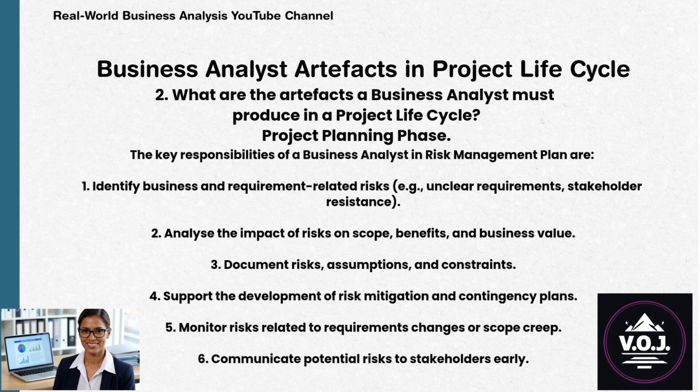The key responsibilities of a business analyst in risk management plan are: 1. Identify business and requirement-related risks, e.g., unclear requirements, stakeholder resistance. 2. Analyze the impact of risks on scope, benefits, and business value. 3. Document risks, assumptions, and constraints.